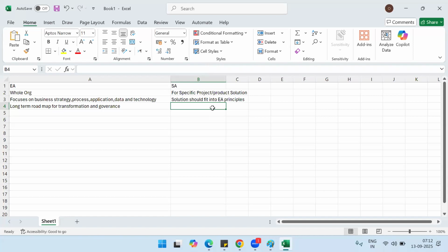For example, you are saying, okay, I will put this into my solution, it is live today. In that case, who is giving the approval? That person, the ADM has given the approval, the business analyst has given the approval. So that is a governing body. And who is the stakeholder? Business is a stakeholder, the sponsor, business stakeholder. And we have the RACI matrix: who is responsible, accountable, consulted, and informed. I think the governing body will look at the RACI matrix and accordingly see if everything is aligned or not.